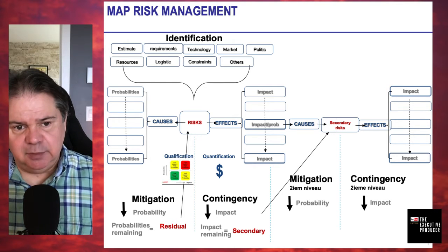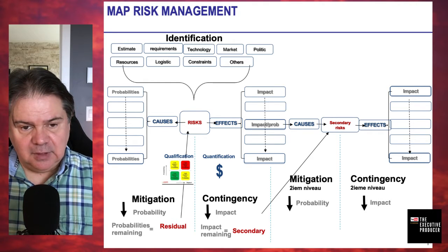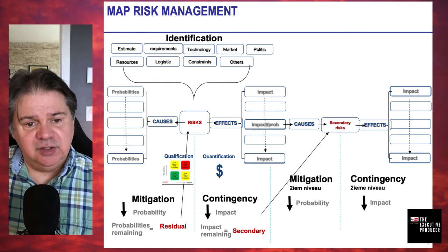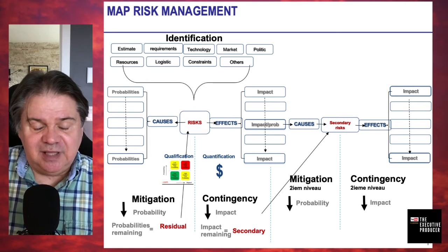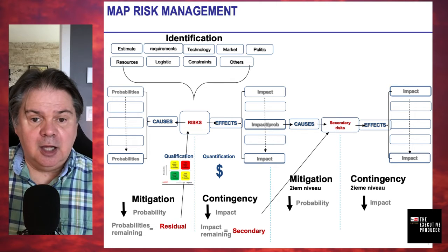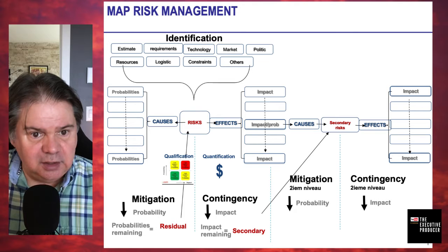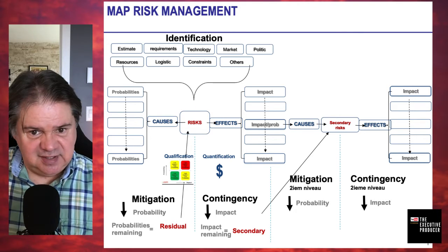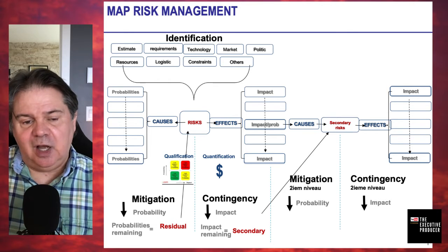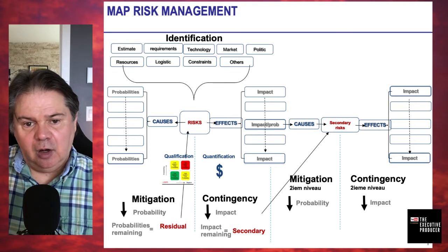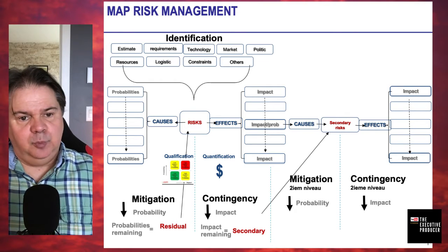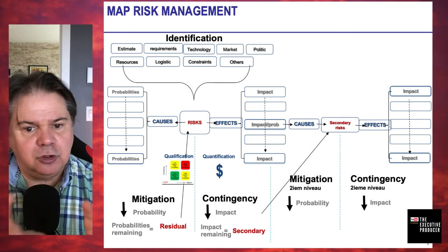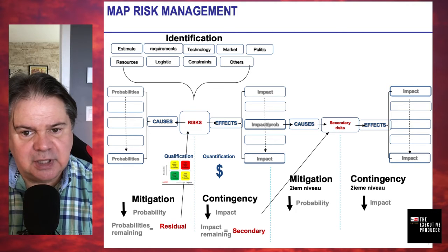There's always going to be an impact even when we have a plan — and that impact could become the cause of a secondary risk. Secondary risks are sometimes very important, sometimes more important than the primary risk. We have to deal with them by reapplying the same thinking: what do I do with the cause, what's the effect? The COVID example is perfect here — the impact of contamination becomes the cause of under-capacity in our ICU or emergency rooms, and that secondary risk needs to be dealt with.